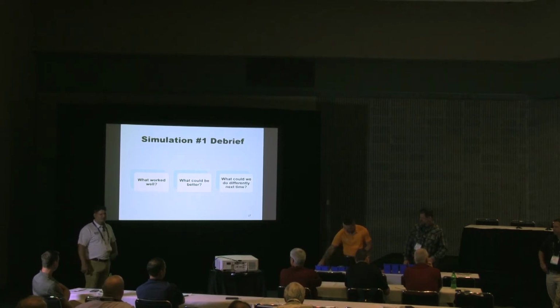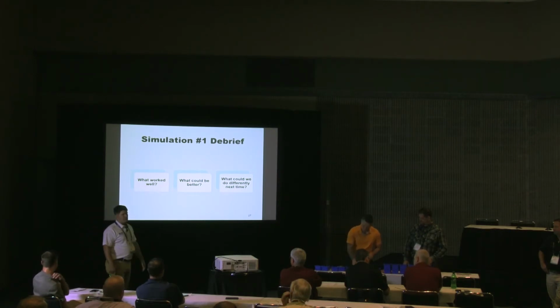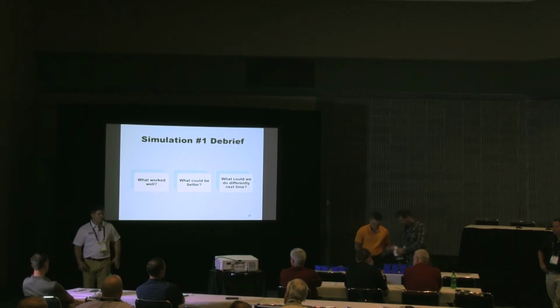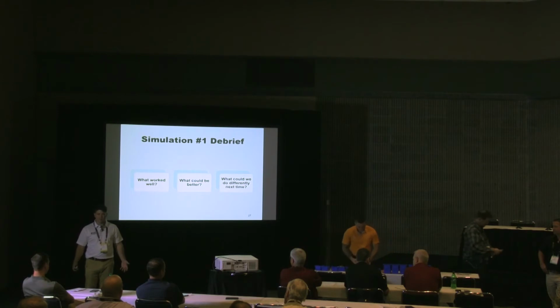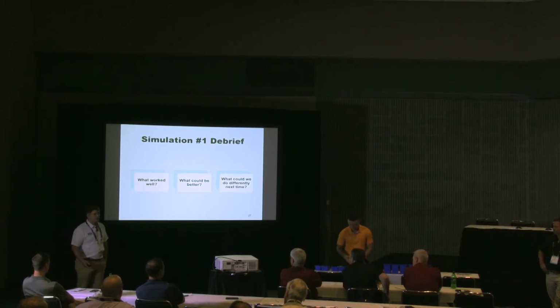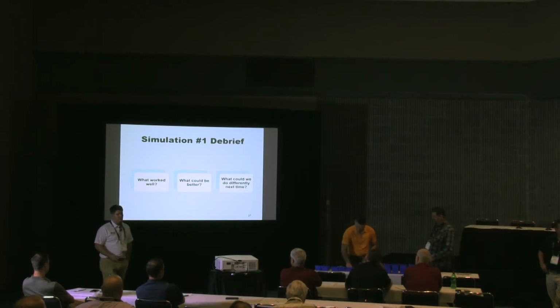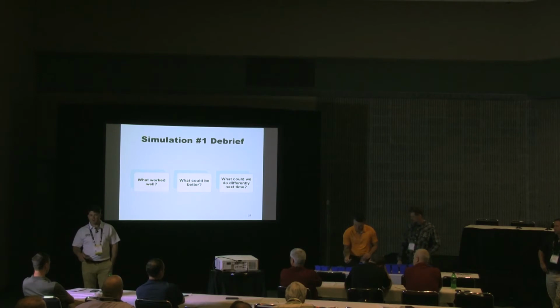And then they say, well, we have a meeting. What's discussed during the meeting? Hey, the last project you gave us was a complete debacle. We need to update this because it took us 350 hours instead of the 200 you quoted. We need to fix this. Did you ever have that conversation? You usually go, well, we had a few mistakes in the past. We made corrections, but is it done on a regular basis? So how are you competitive on jobs if you don't understand what your real standard times are to make things?